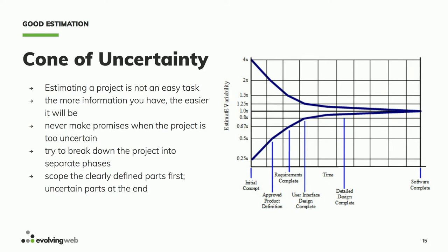We put the most defined, easy, reusable, non-negotiable tasks in phase one. Phase two is the stuff that the client would like to have, but they haven't quite given us enough information. And phase three, or whatever it is, you slice it up how you want, are the things that are speculated. Next project, maintenance, we'll do it as part of ongoing maintenance after launch. And so then we jiggle things.